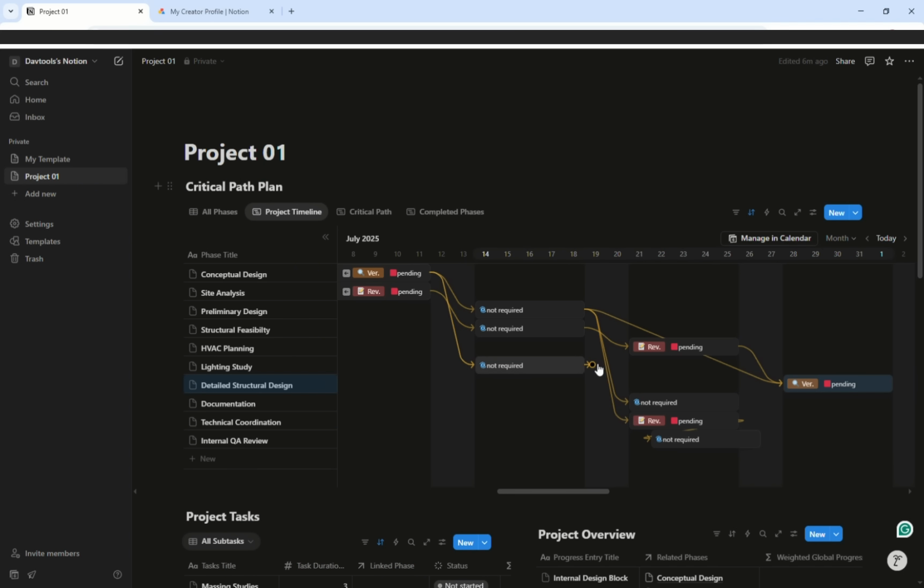At this point, we decide to adjust the length of each phase to match the total estimated duration of the tasks it contains. Delay messages indicate that the task durations require the phase to be extended. On the other hand, time margin messages suggest that there is a buffer that could be managed. However, in this example, we want every phase to show OK, meaning that the phase length matches the total estimated time of its activities.